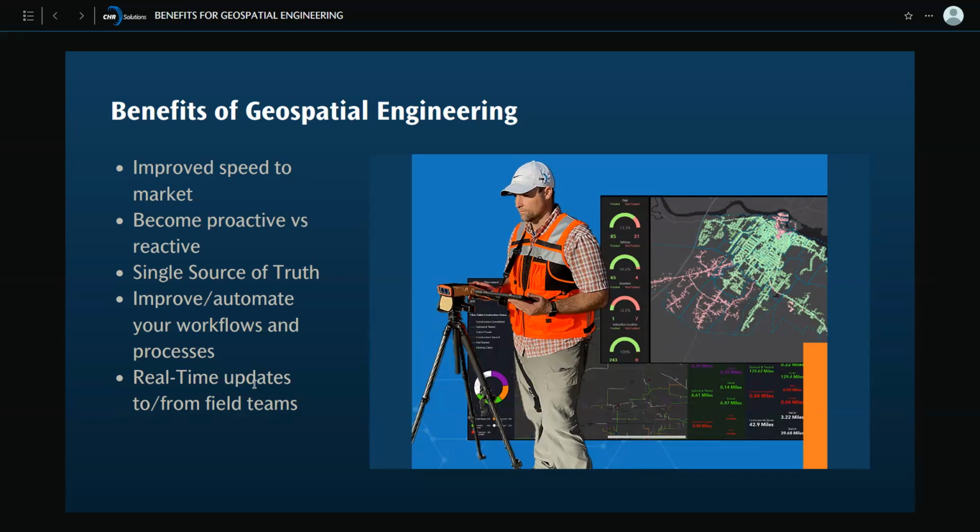And then the ability to improve your speed to market, because I'm able now to work on design at the same time I'm doing permitting. I've sped up my workflow. The old method was design had to be done and then we went to permitting. Well, permitting is going to be your longest lead time effort in your entire workflow. I can condense that because now I'm able to work that during design. So let's just say a design took me 3 weeks. That's 3 weeks that I've already got done with permitting, and it's sitting with the agencies now. And they're able to approve that 3 weeks sooner because I was able to work that in conjunction with that design. So those are the big 3.